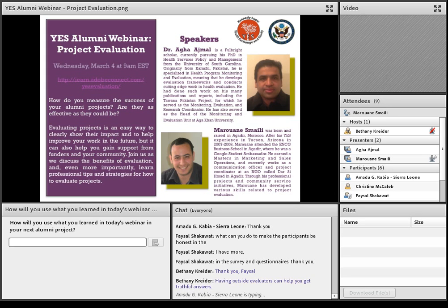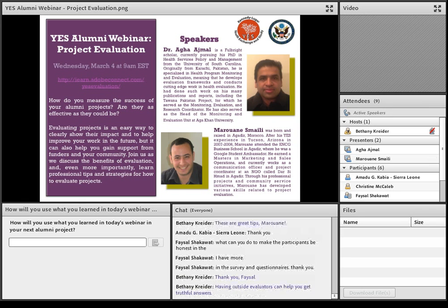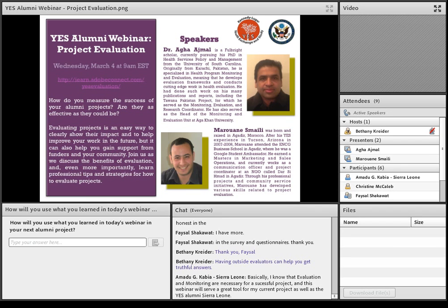Ajmal said, I will give you two tips on this point. First, when we come to the sensitive parts, which are data collection and analysis, it is always good to give them to a third party. It's a principle, like in an audit. When auditing a company, the first thing they learn is to bring a third party, because the third party won't be biased. They don't know the company, they do not belong to it, and they do not share its culture. So they will be more objective.